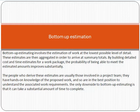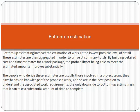Bottom-up estimation is a technique or approach which we use to estimate the time or cost to complete any activity. In bottom-up estimation, what we do is divide the work to the lowest level — into work packages. We identify the activities, then estimate the time or cost for the lowest level, and then aggregate upward in order to arrive at summary totals.